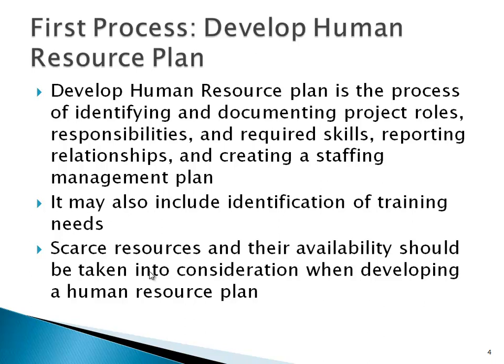Scarce resources and their availability should be taken into consideration when developing the plan, especially if we are sharing these resources between different projects. And usually the project managers will be fighting over these scarce resources to get their project done. So we have to consider that when planning for a project.